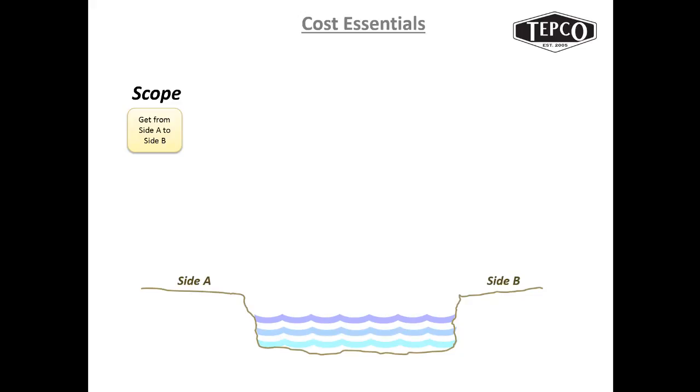If scope is not clearly identified and detailed exactly what we want to do, it can cause for inadequate job plans, not enough job plans, and that does affect the cost and the schedule. That's why we request that scope's fully detailed. There will come a time where scope is frozen, and once we get the scope and we put it all together, we do have the ability to give a plus or minus 50% estimate, cost estimate, based on the